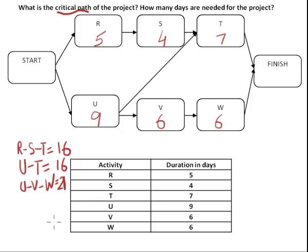So which is the longest path in the network? Longest path is start, U, V, W and finish. So that's our answer to the first question.